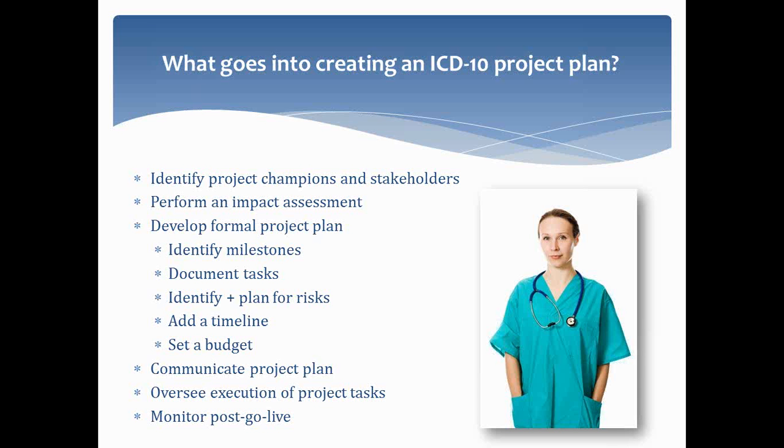On the risk side, the positive piece is that you're planning for those risks so that you can plan for how to mitigate those, how to address them. So make sure that you have a way for staff and everyone to report issues, and you have a decision-making chain in place to address issues and resolve those quickly, and then plan through what some of the resolution processes might be in certain common challenges that you might have. So those are very important in terms of planning for risks with your project.